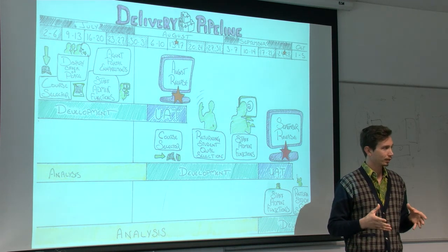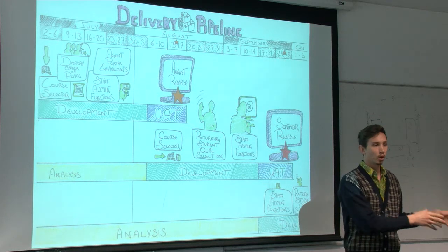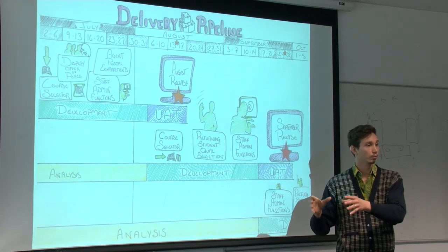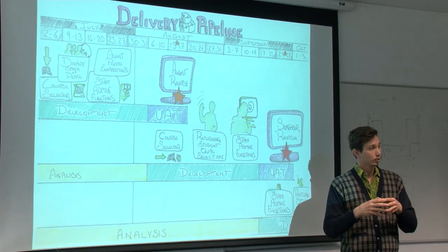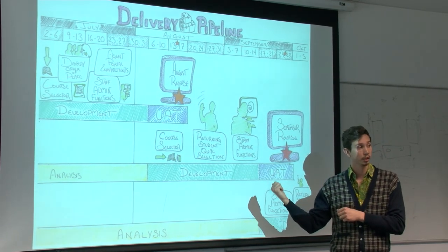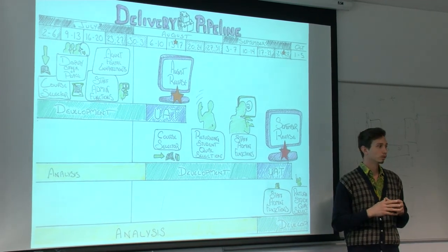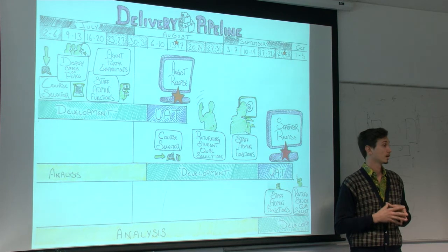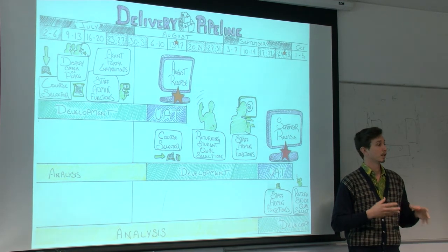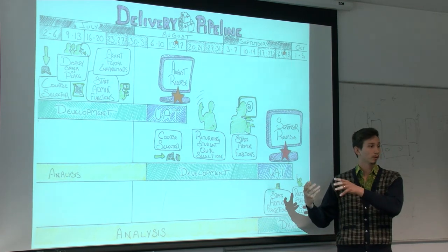That's the decision-making authority. So that's a composite group of the different product owners from the different streams of work and projects. And those people have a voice in the final things that get prioritized and what ultimately gets pushed into these releases. So definitely talk to each other, talk to your bosses, talk to us, if you think there are things that need to be changed, prioritized, so that we can get that voice heard when we talk about priorities with the DMA.